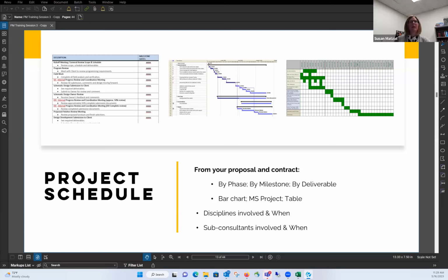Great. We have done a couple of one-off projects for Avant-Grid where we ran an internal schedule in Microsoft Project, all the way down from the milestones through the tasks, and then we created a trimmed version of that so that we could present it to external stakeholders through progress updates.